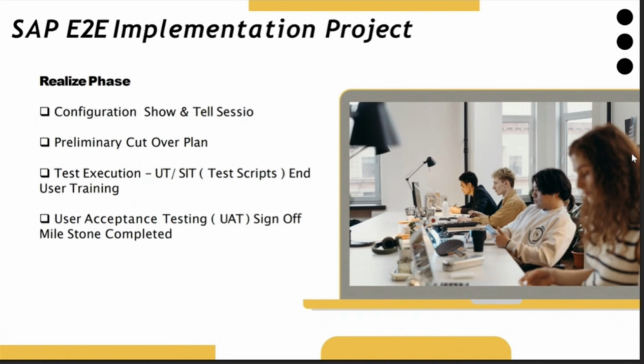So this is also one of the most critical deliverables in an implementation project, because until he says that the UAT process has succeeded, you cannot proceed further. Maybe with a DPD, something is there, you can proceed further, but without UAT you cannot proceed further. Agree?